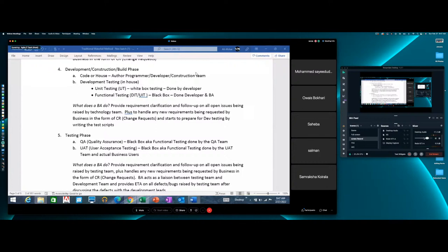You understand? So when you as a BA, if you are my BA, you should be telling me, Ali, we have started testing modules A, B, and C, right? On A, we have completed about 40% of the testing. On module B, we have completed 20% of the testing. On the final module, we have just started it, so we've only completed 10%. You see the details I'm providing you?